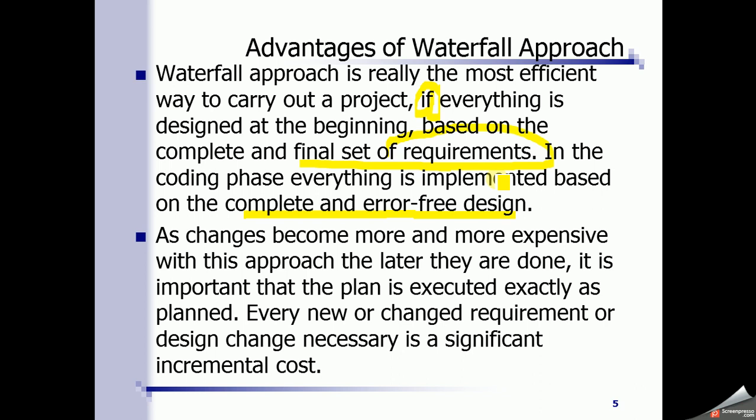The problem in the waterfall development approach is that the changes become more and more expensive the later they are done. Okay? If the changes are done in the earlier phases, they are cheap. But let's say you have gathered requirements and after that you made the design, then you wrote the code.